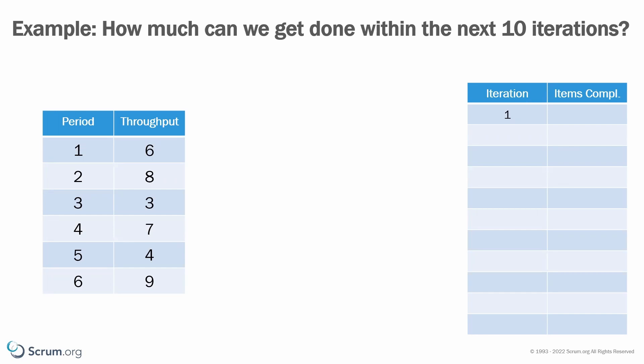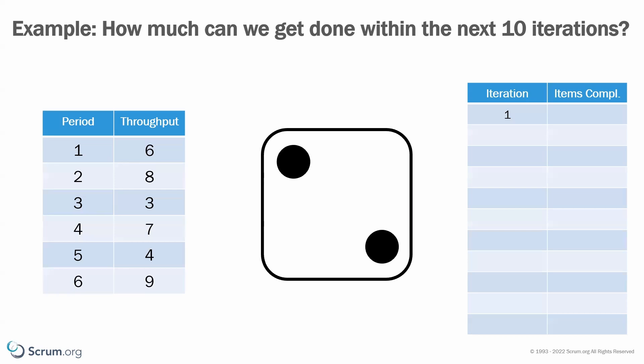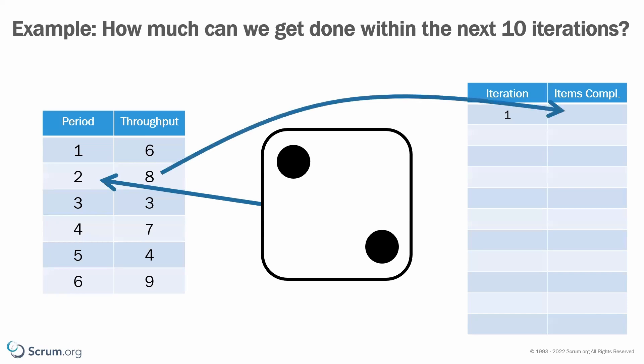On the right side, we refer to these as iterations, and those iterations are looking into the future. They have to be exactly the same time frames as the periods in our historic data. We are now choosing one of those historical data sets randomly — we simulate this by rolling a dice. It shows two, so we go to period number two and use the throughput for this period and put it into our result list on the right side.